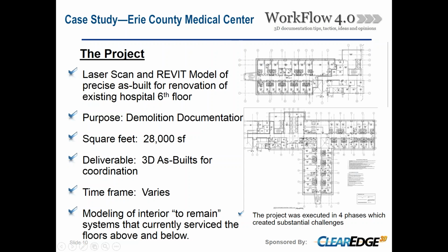And when we did go out there, as you can see in the images over here, this hospital actually has 4 different wings. The one wing, which is right here, we didn't actually do any renovation for, but we did on the other 3. So that's why we had to phase it, because they were working in different zones at different times.